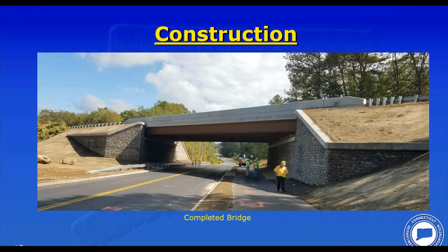7 months. Was that 10? I think 7 months. Versus the other project, it was 15 months. So the real difference was that the previous project saved more time in construction, thereby reducing the overall project cost by reducing the construction, engineering, and inspection costs. Here the ABC project wasn't that much faster than conventional construction, which is why we could not overcome the additional ABC cost with savings in construction management. So that's the primary reason why this went that way.